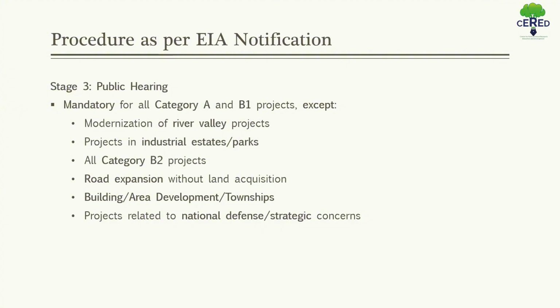All projects or activities located within industrial estates or parks. Expansion of road or highway which does not involve any further land acquisition. All building, construction, area development, and township projects are all exempted from public hearing. And all category B2 projects. Also, all projects or activities concerning national defense and security or involving other strategic consideration as determined by the central government.